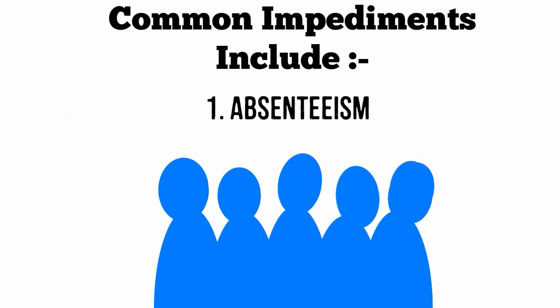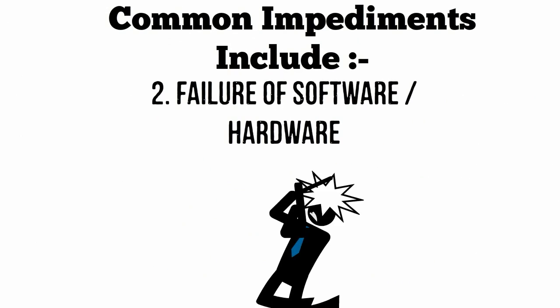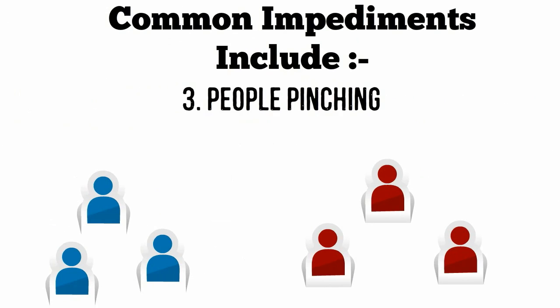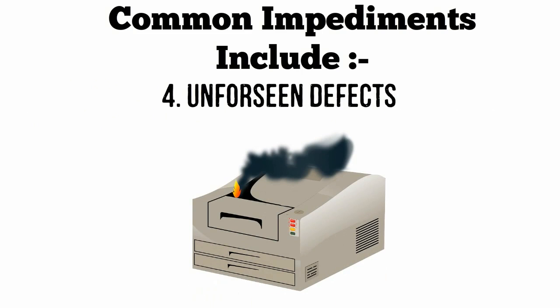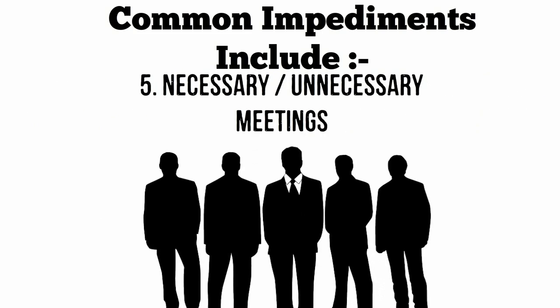Common impediments to delivery are: 1. Absenteeism. 2. Failure of software or hardware resources. 3. People pinching — team members move to other teams. 4. Unforeseen defects with the product. 5. Necessary and unnecessary meetings.